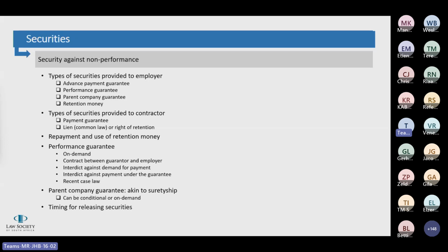In order for a contractor to succeed in respect of the fraud exception, it has to prove that the beneficiary presented documents or facts or made allegations to the guarantor, knowing at the time of so presenting to the guarantor that it constitutes a material misrepresentation of fact upon which the guarantor will rely and which the beneficiary knew to have been untrue. A mere error, misunderstanding, dispute, or oversight is not sufficient to amount to fraud, nor is it enough to show that the beneficiary's contentions were simply incorrect.